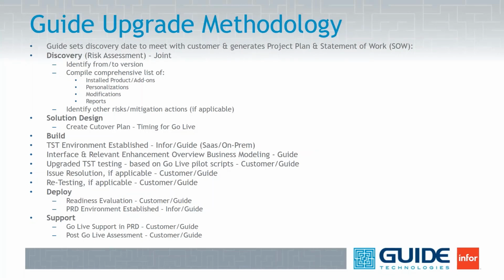We have an upgrade methodology. We set a discovery, and we talk with you about what you're trying to achieve, what your business goals are, what your timeline is, what your team's bandwidth is, and where you want the division of effort, and we'll potentially set up a discovery or risk assessment. This will be a joint effort between you and Guide Technology Professional Services. We'll design a solution, create a cutover plan, put a stake in the ground for going live, and create a project plan.